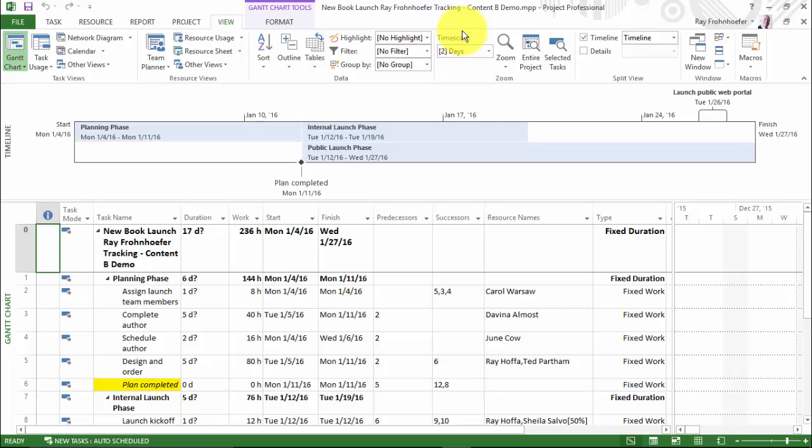So one way you can take care of that is if you tinker with the plan a little bit, pretty it up, make some minor changes, save a new baseline, save a new tracking version, and move forward from there. But hopefully you would not encounter that.